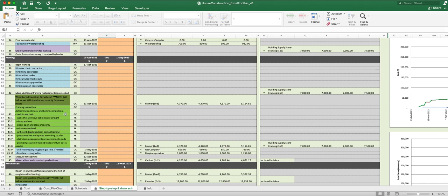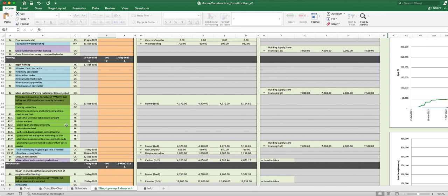As framing continues and before the completion, check to see that all these things are done. While framing is going on, you're walking through and you're checking these types of things like walls that have cabinets are straight, the doors level, the doors open and close smoothly, windows level, sufficient deadwood is in ceiling framing, the joists are sized and spaced according to the plan, the stair riser measurements are according to code.